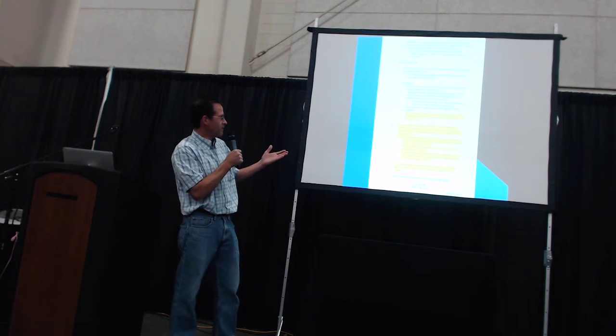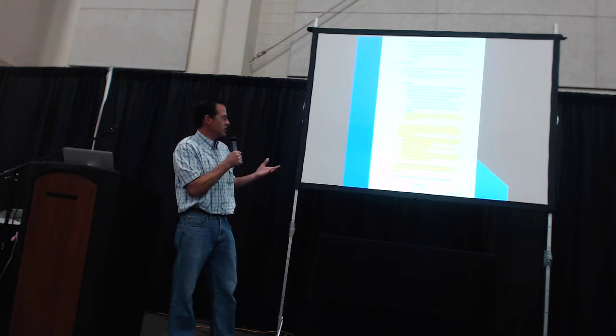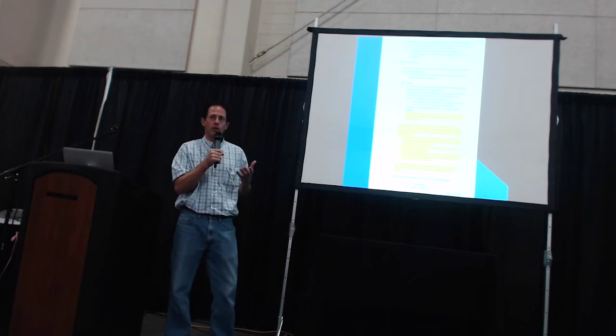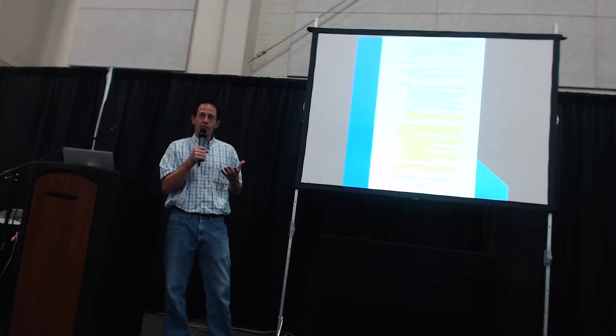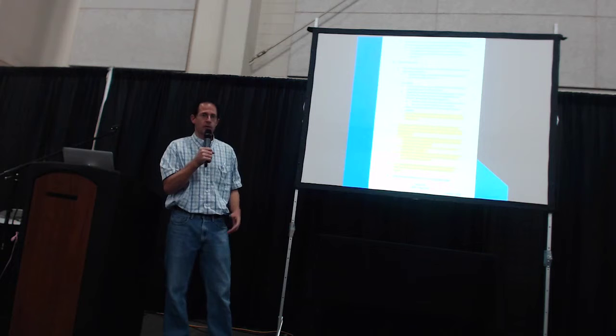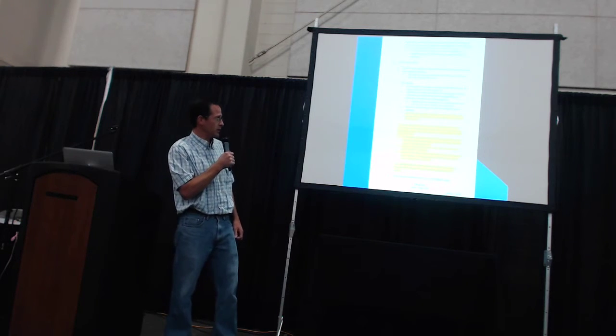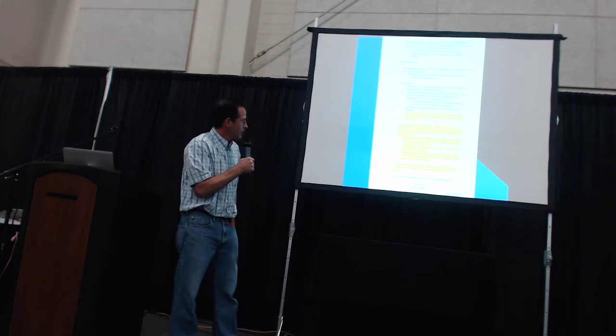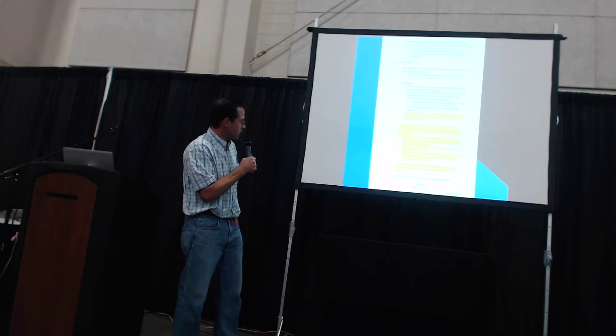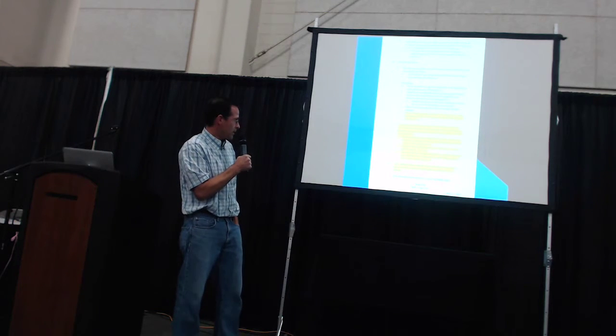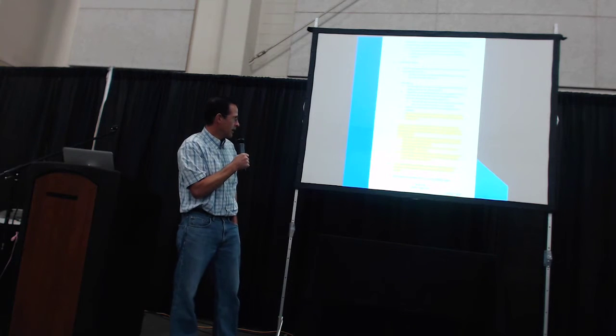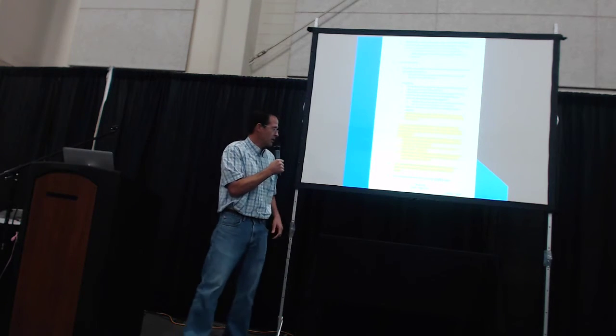So if the criteria have not been met, the engineer needs to know. The structural engineer will do an evaluation to see if it's detrimental to the structure, so it's critical that the structural engineer is informed. Drive additional piles as required to replace damaged piles and piles driven out of plumb or plan location at locations designated by the engineer.